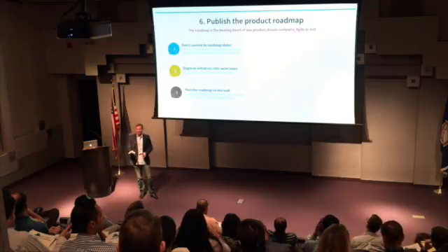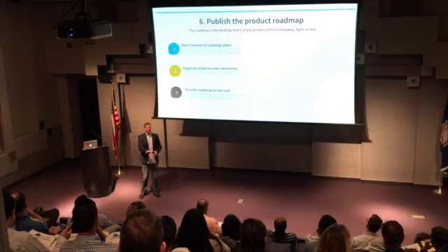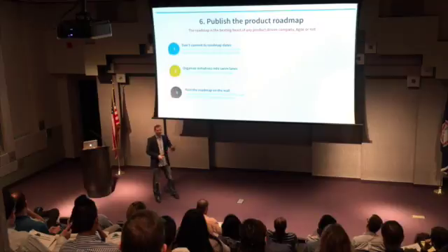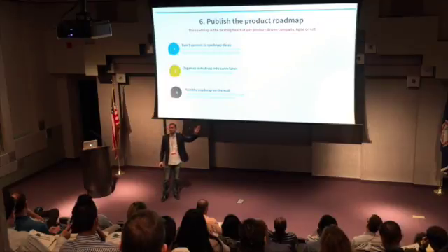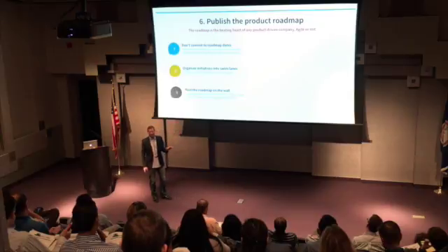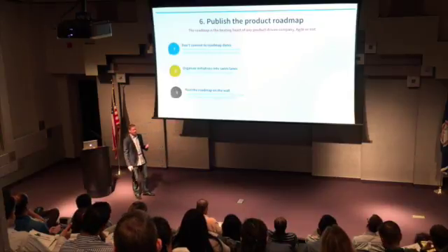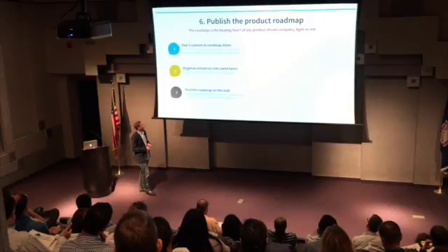I'm working on this task because it's part of this user story, which is part of this initiative, which is going to close this gap, which is identified to the stakeholder to try to go hit this KPI. That's the golden ticket, right? If you can make that happen. And it would be great to have that kind of thing happening throughout the entire organization, both for the sake of the engineer as well as the CEO and everybody else in between. So organizing them into swim lanes can be helpful.